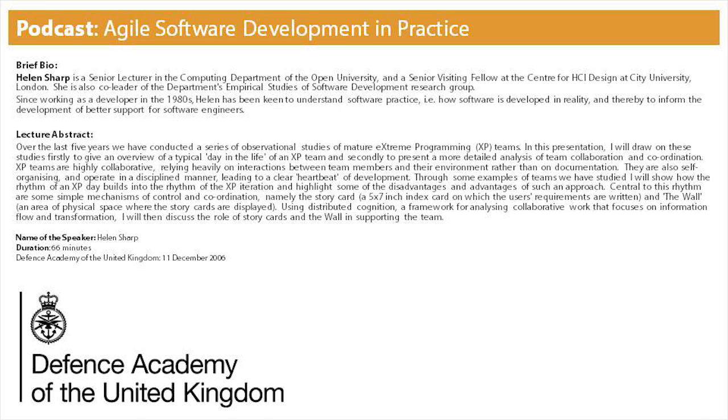So anyway, you've got the cards there, so they've got annotations on them, and they all mean something. Different colours are relevant. And then over here you have something called the wall. At the end of the planning game, once they've decided what stories they're going to do this iteration, the cards get put up on the wall. So this, if you like, is a kind of project plan. It's a real live Gantt chart of things actually happening, what's going on here. And in fact, this was at the end of an iteration. So at the beginning, you'd have these cards spread up over the wall, but as it's at the end, they're all at the bottom. And I'll explain what I mean by that in a moment.